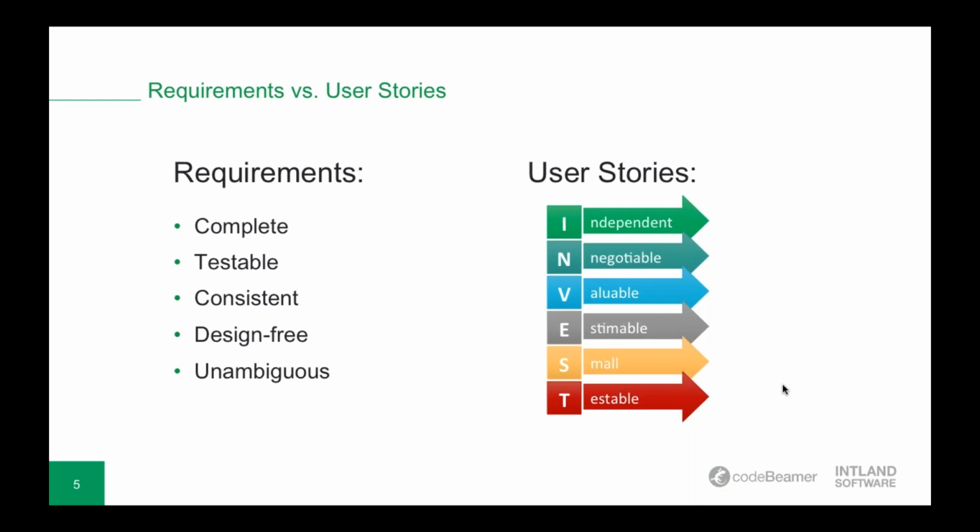On the other hand, our development team here at Intland, for example, uses Scrum, which is something that I will talk about in more detail a little bit later, and we don't use requirements at all. So what we do is we define user stories, tasks, and then change requests. And we receive our user stories and define acceptance criteria for each user story. If something needs to be changed, we track change requests separately. So in our case, those two, user stories and change requests, are the most similar to requirements. Okay, and it's all about how you define your internal processes, actually.